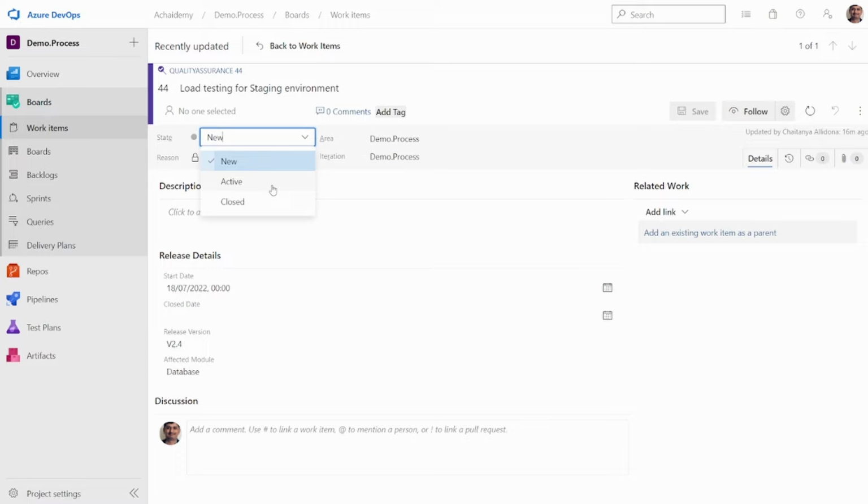So it would make sense to define various states for these scenarios, which will help you track how much time your team is blocked because of something, and how much time your team is working on an issue on a quality assurance but is waiting for data to be received, or for a release to be made. So various states will give you those metrics to know where your team is doing well and not doing well, and accordingly optimize your processes and your steps.